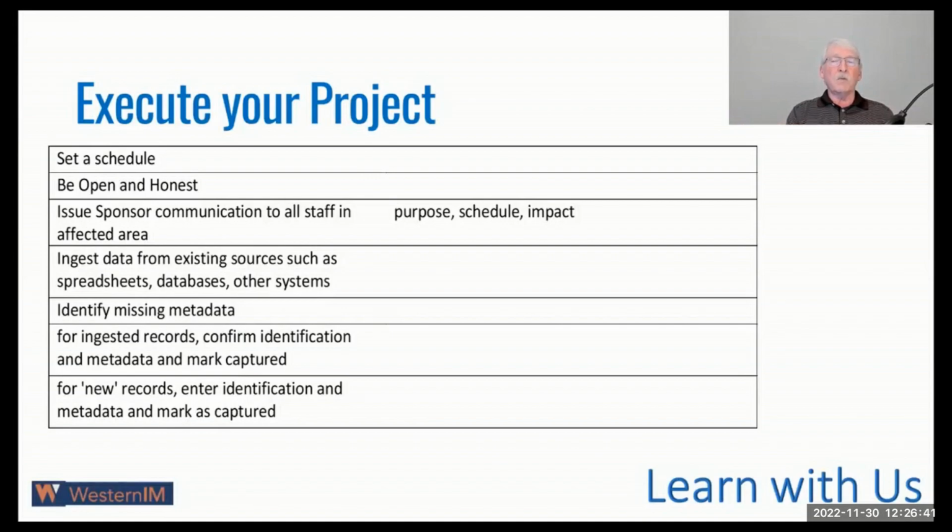Again, it's sometimes a little bit of a time-consuming effort, but it's really good to do if you can. Then you've got the data in there, especially if you're doing a validation project. In other words, we've got a box, we think we know what's in it, but we're not sure. And nobody's going to give us the authority to destroy the box unless we actually validate what we think is in the box. So that would be the reason to ingest the old metadata from previous spreadsheets or databases. And identify any missing metadata after you do that kind of ingestion of the information.